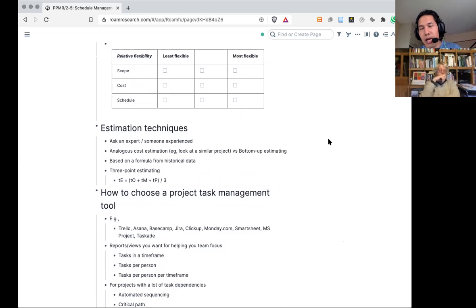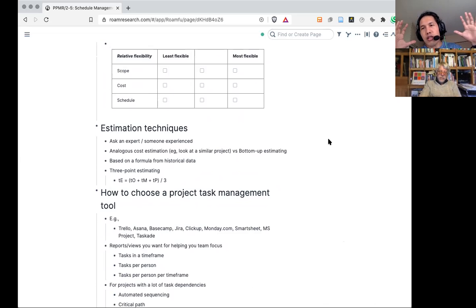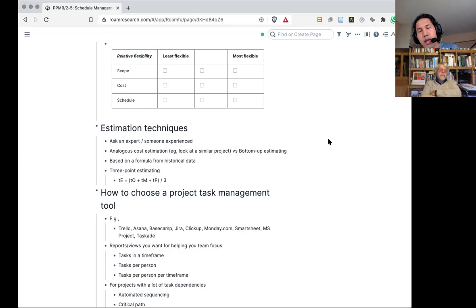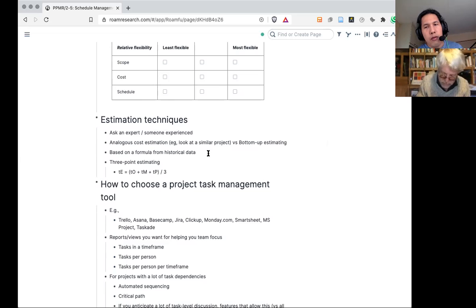What I normally use is simply asking someone who's done a similar project before. You could also do bottom-up estimating, or ask someone for an analogous estimate — like the overall duration of a similar project. Bottom-up means you have your list of tasks, your WBS, and you line them up in your bar chart or Gantt chart or calendar, ask how long each takes, and based on dependencies you build a Gantt chart. You could also use a formula from historical data.